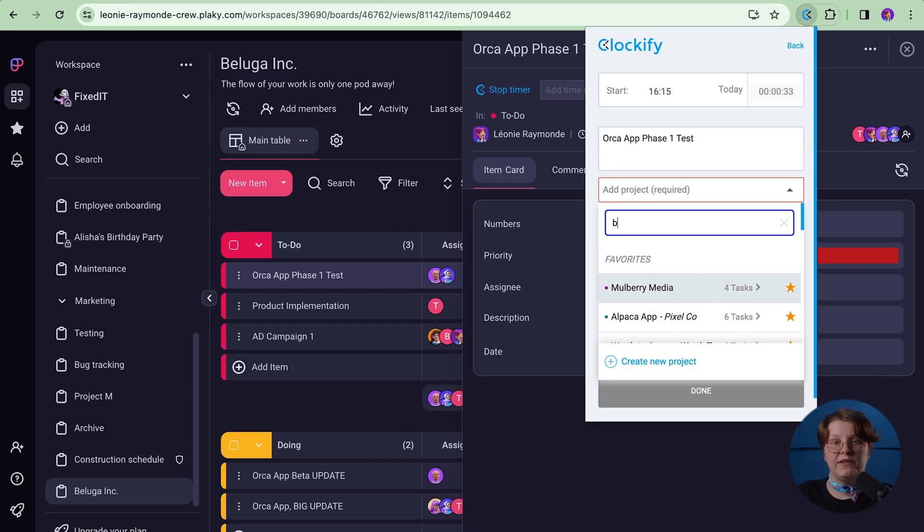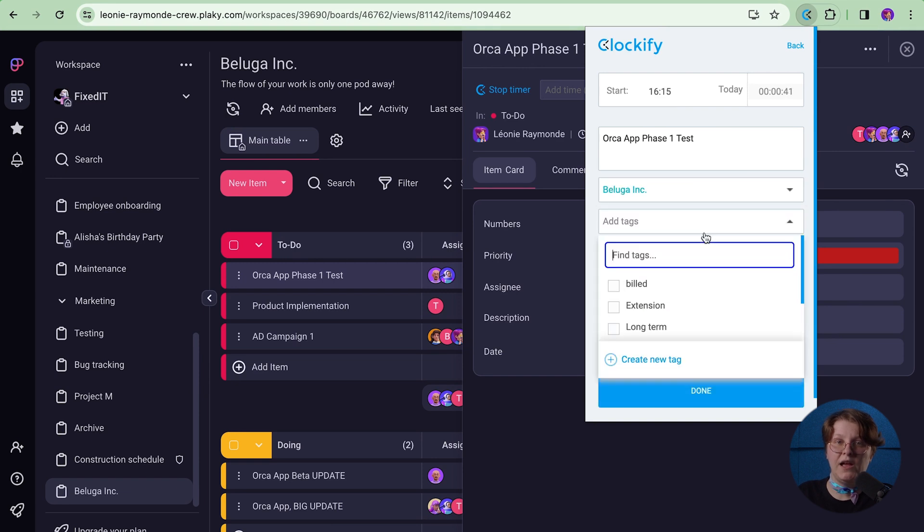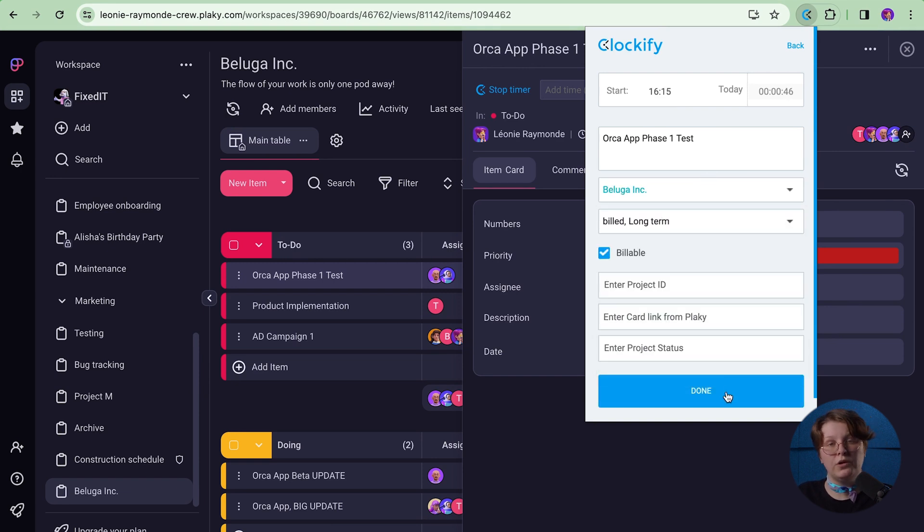When you stop the timer for that activity, you can tie it to a project, add the same tag you have for it in PlayKey and mark it as billable or non-billable, depending on its type.